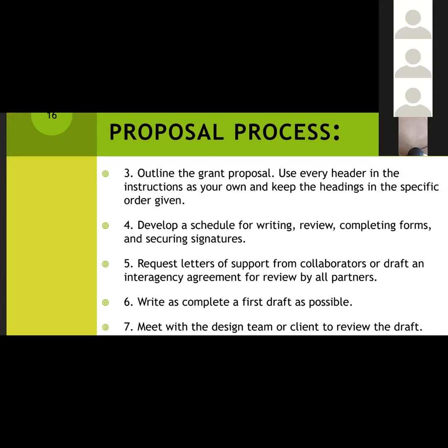Then again, come up with a schedule for writing, reviewing, completing the forms, and securing the signatures. Because what you find is that most organizations do not come up with a schedule for doing all these things. And so at the deadline for submission is when they are trying to write, at the same time complete the necessary forms, and also secure signatures. So what happens is that they send incomplete applications. This is one of the challenges that we always find. So it's always good to have an orderly process to keep to the schedule and ensure that we can submit within the deadline.